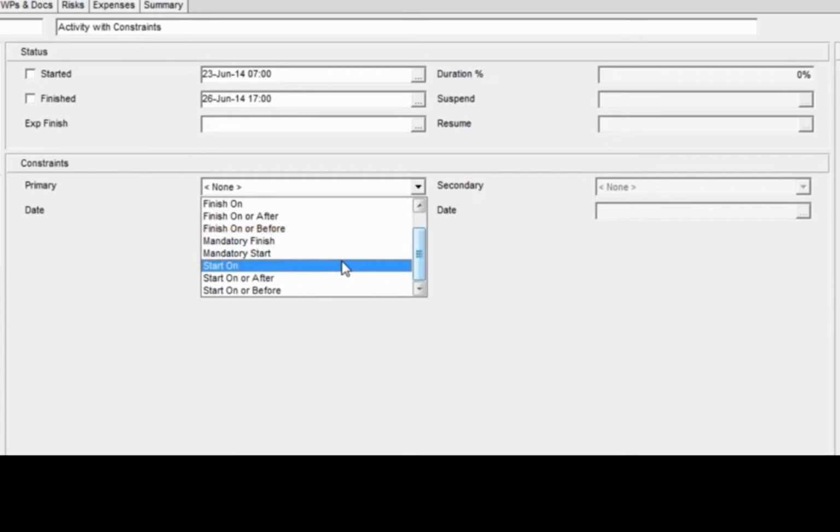Because if an activity network is set up as predecessors to that constraint, so let's say that I put a mandatory finish milestone constraint on the entire project, if my activity network or my critical path starts getting delayed and pushes into that milestone, the network will actually go over the top of the milestone and the milestone will not be pushed. It locks it in place.